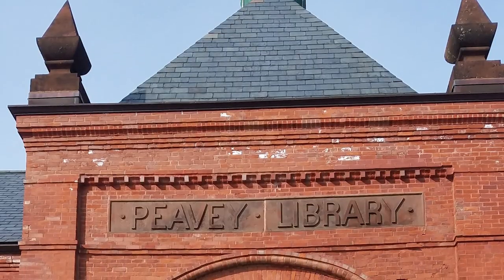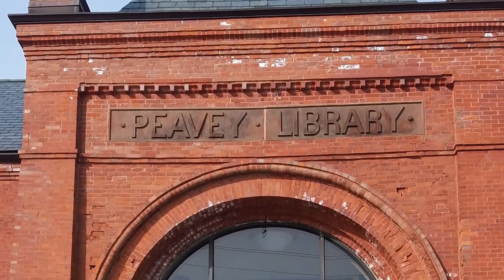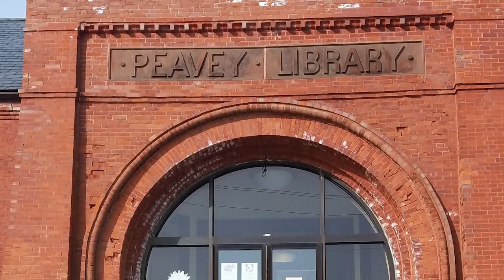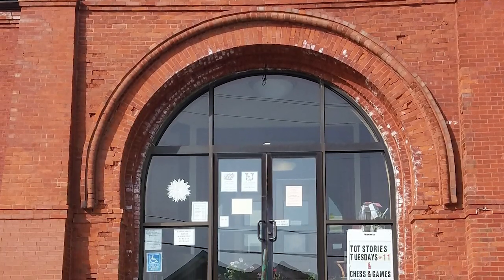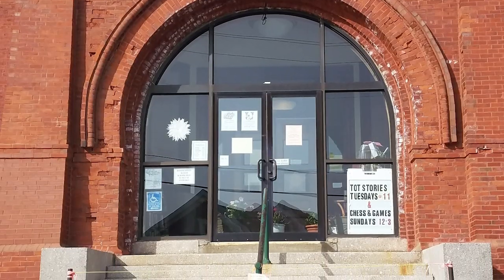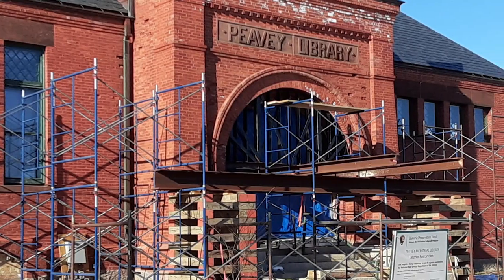Artifacts assessed the building and developed a plan in 2019, with engineering support from Dr. David Lee Gress and Thornton Tomasetti. Their findings resulted in closure of the iconic arched entry, which was structurally compromised along its foundation. The report also attributed the inappropriate addition of insulation to the building as the leading culprit in trapping moisture within the brick walls. The first order of business was to shore up the arched entry to protect against massive failure and remove the detrimental insulation.